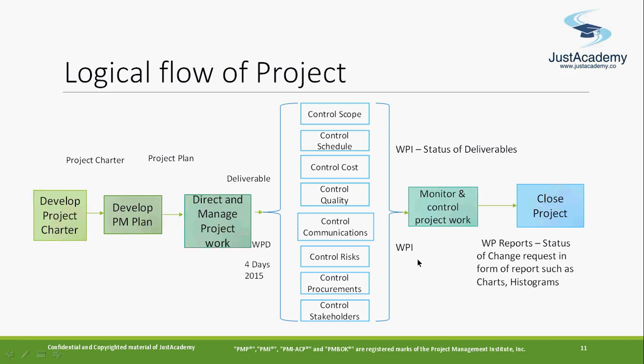So, okay, fine. What is completed, I enter in the WPD. What needs to be done goes in the WPI. And once you see that, based on that, at the overall project level you monitor it, and you say, has the project got delayed? You were supposed to complete in 7 days. Now you are asking for 7 more days again. So on a high-level project view, you see this activity can affect my project, or this activity has actually got delayed.